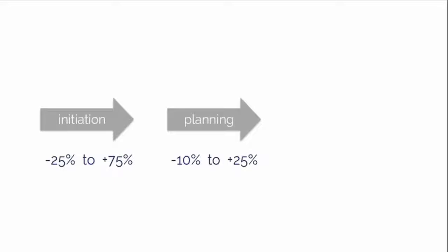During the planning phase, budget estimates can narrow the range of accuracy to -10% to +25%. Later in the project, during final user acceptance testing, you are much more confident in your estimate, so you create a definitive estimate, and the accuracy level should range from -5% to +10%. So, as you gather more information and become more involved in the project details, your estimates become more definite.